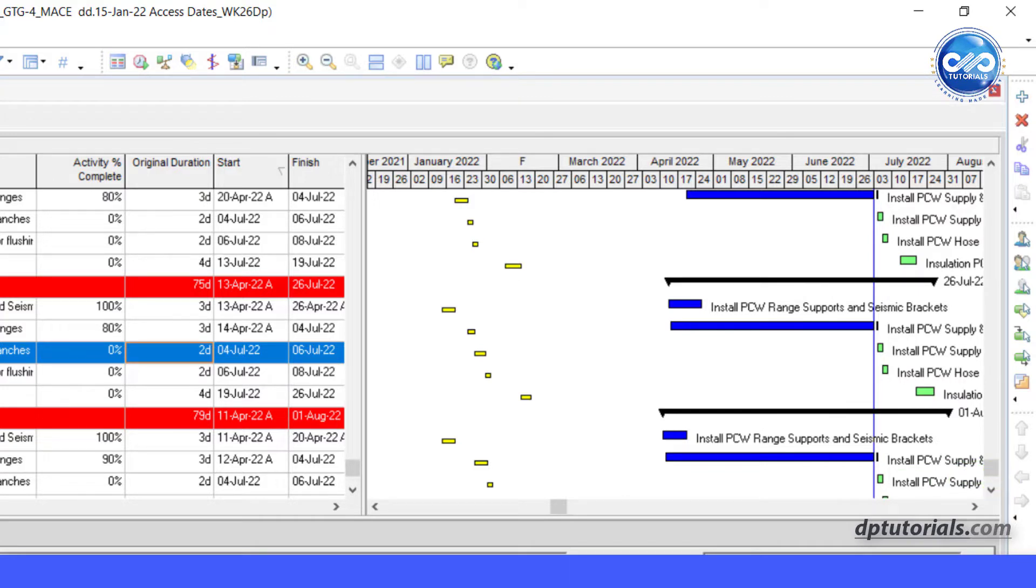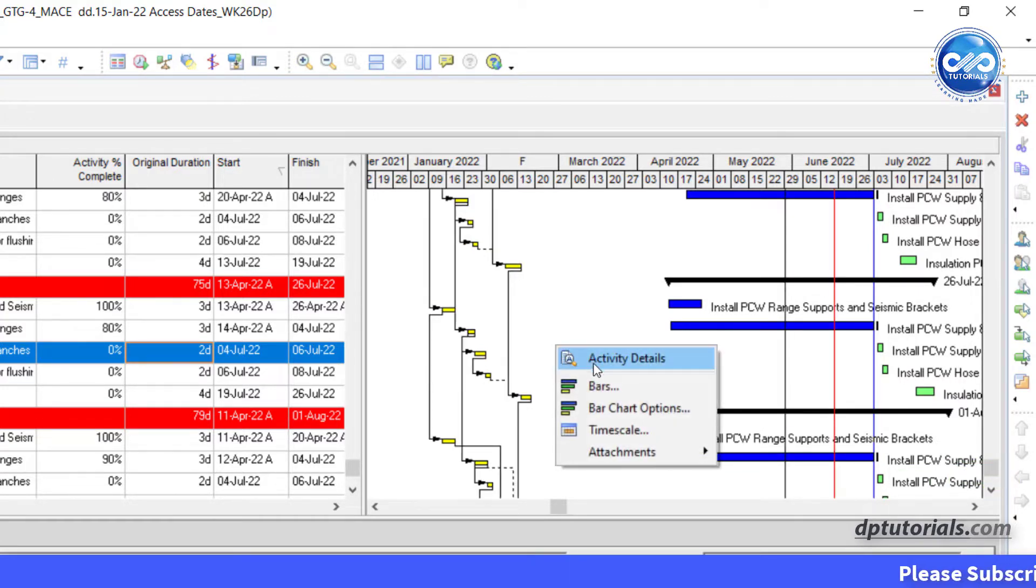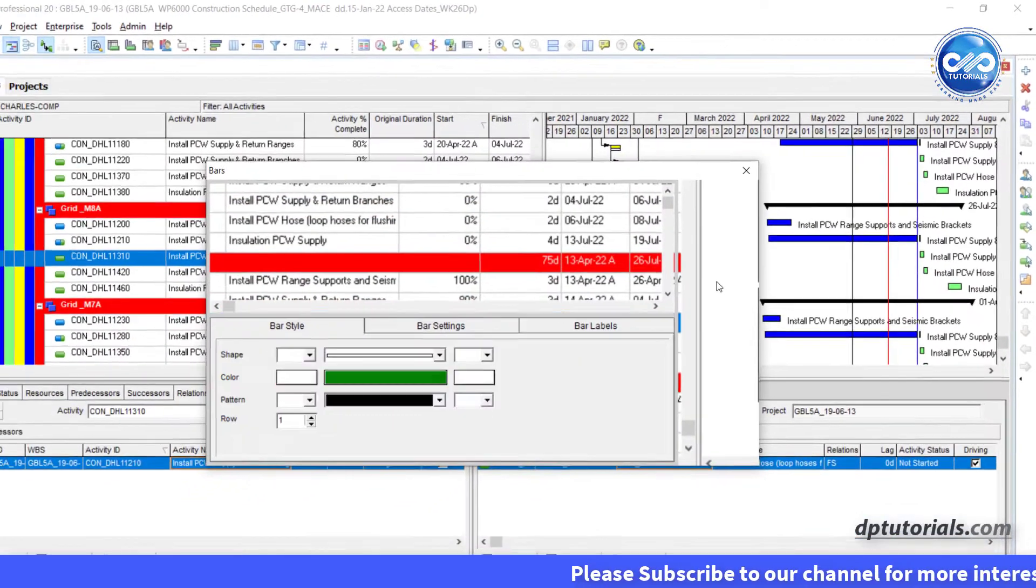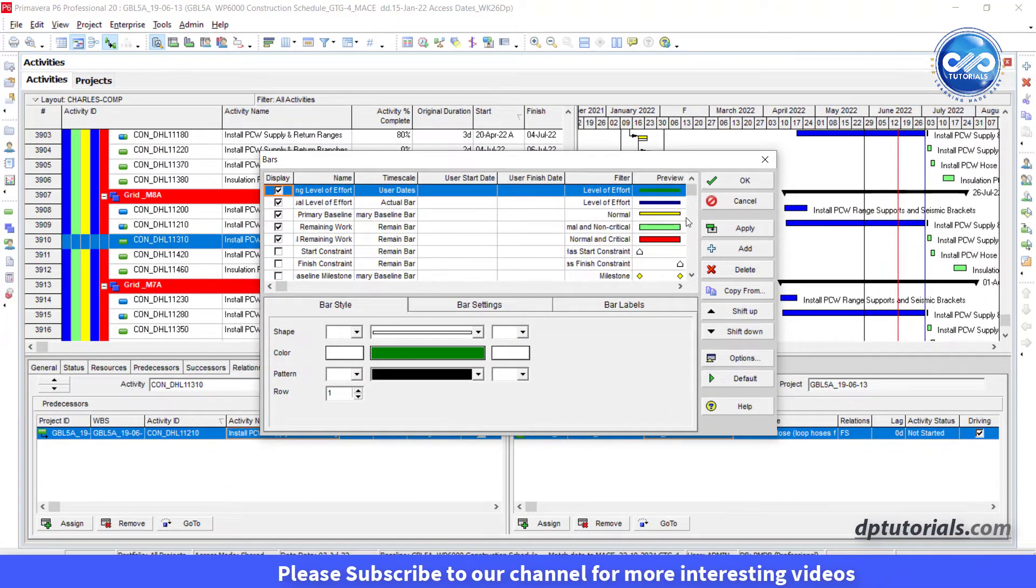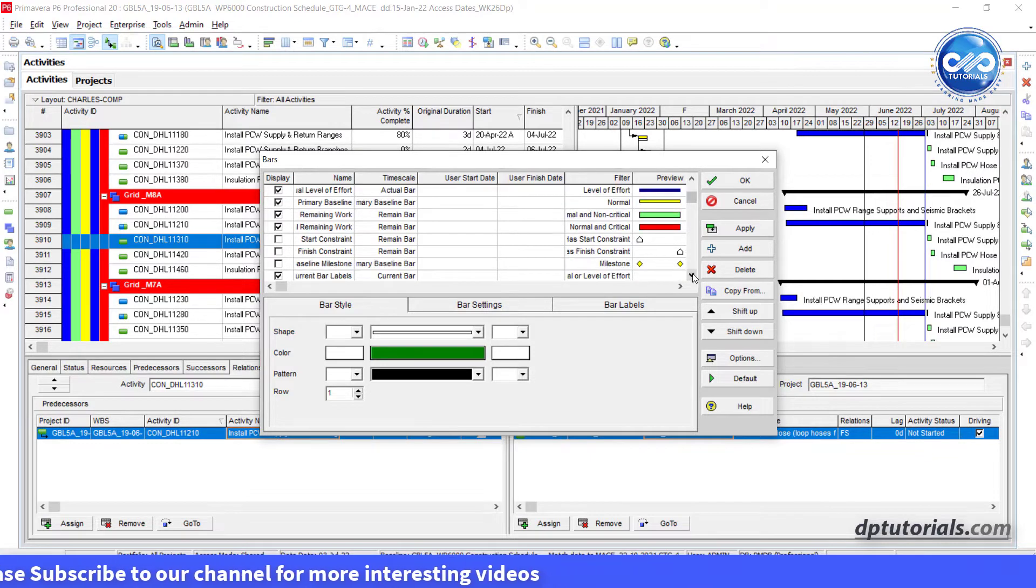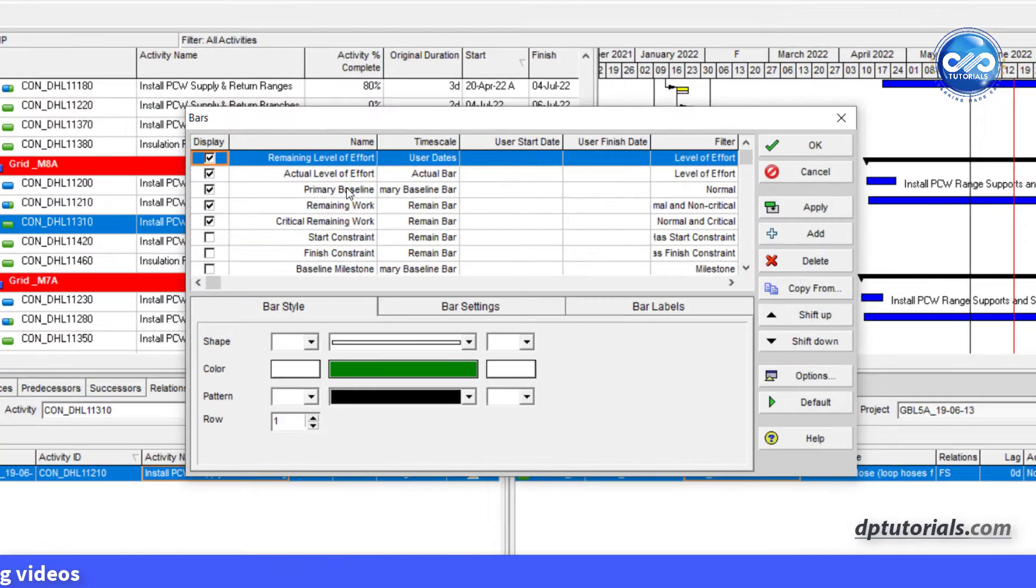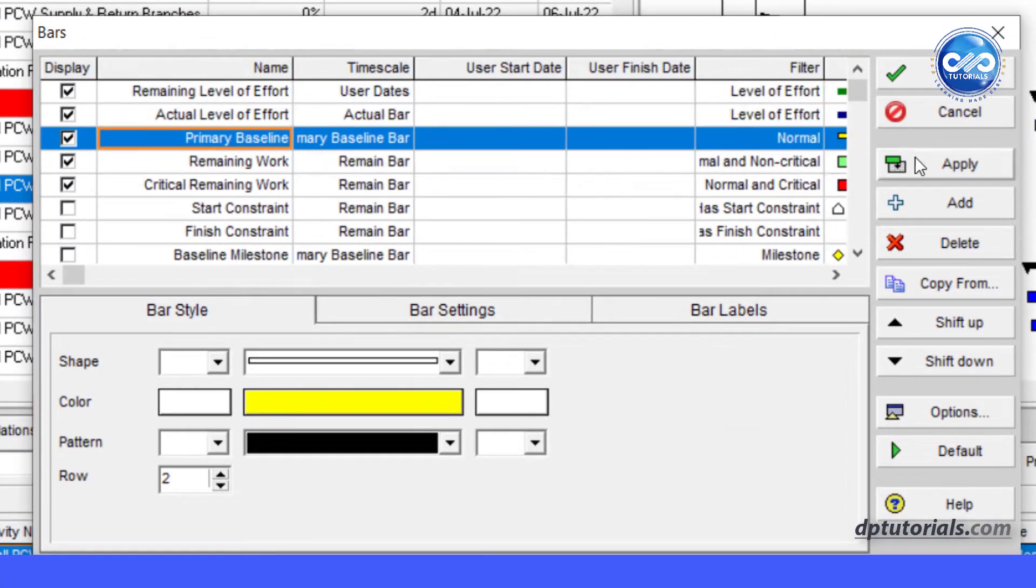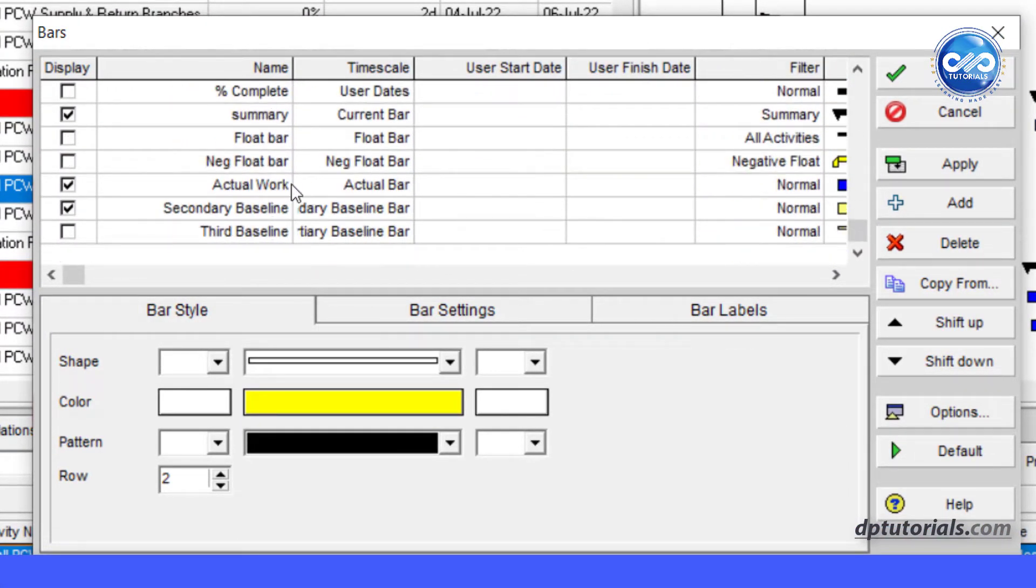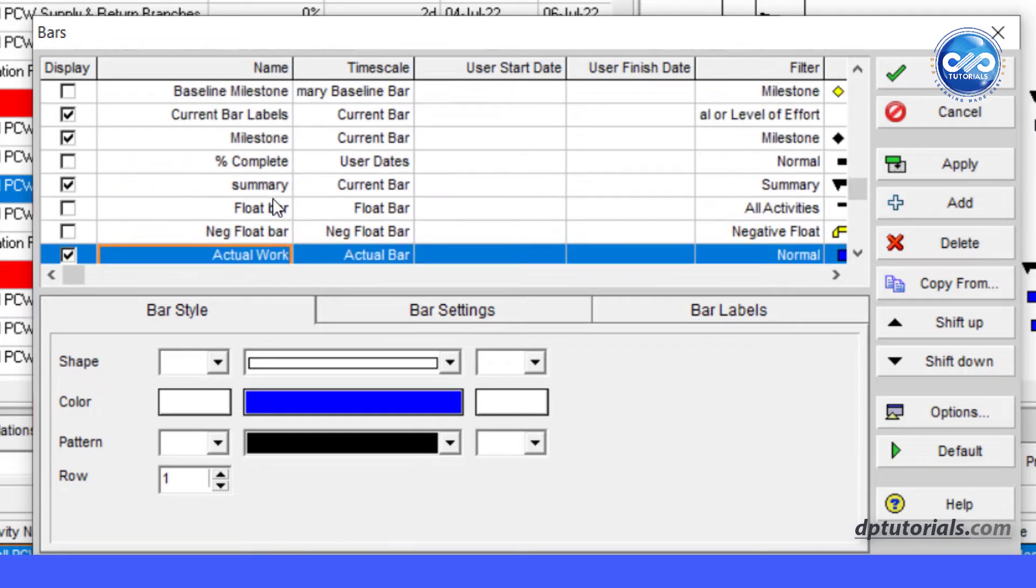Right click on the Gantt chart and click on Bars. You have to note that these bars have some importance of the order in which they are. You will notice that our project baseline bar is at the top here and the actual bar, remaining bars are at the bottom lower than the baseline bar.